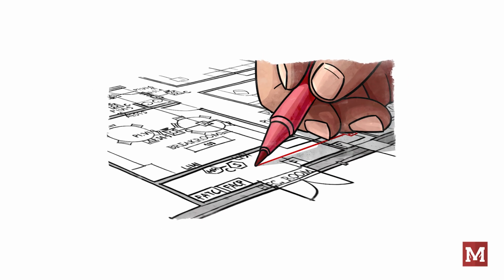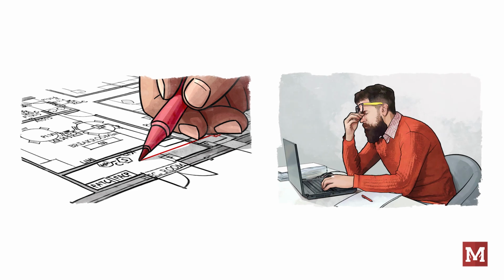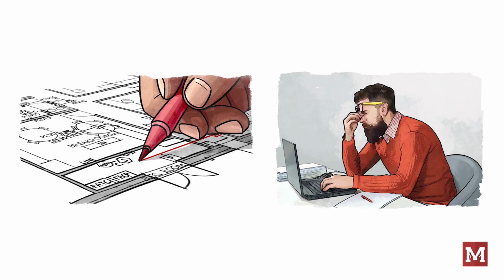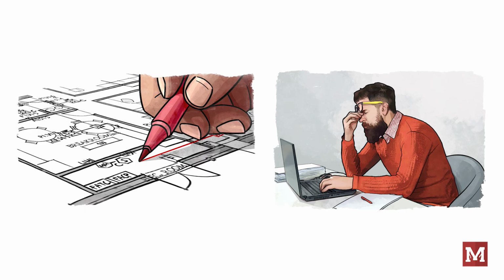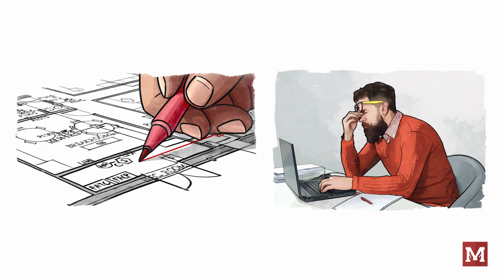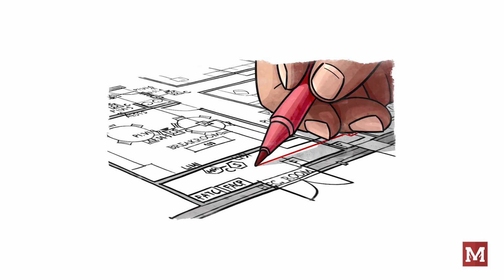So the primary purpose of the contract documents is to clearly communicate the scope of work to the contractors. When the scope is unclear, projects rely on RFIs, change orders, and assumptions, which can add a lot of time, money, and headaches to a project, not to mention disputes, finger-pointing, and sometimes lawsuits. The scope of work must be communicated clearly through the drawings and specifications. It's our job, no matter which role we play in a project, to make sure we understand and are conveying the scope properly. No one person is responsible for the entirety of the contract documents, but everyone plays a part.